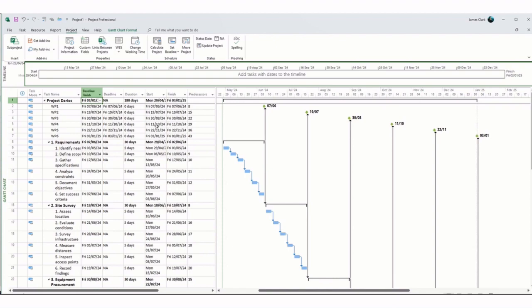So back to the purpose of this exercise: I want some metrics to measure against. I want to measure my baseline finish against my anticipated finish date. So I'm going to remember those fields that I want. I'm going to use the name, the baseline finish, and the anticipated finish date. So that's 3 columns from this spreadsheet.